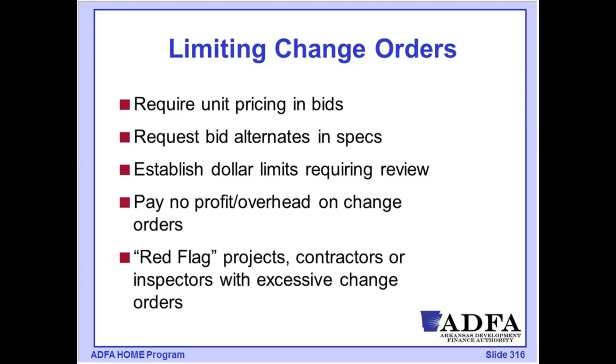We might have some bid alternatives within the specifications, so they'd already been priced as part of that process. We can put dollar limits in place for when that review is being required. Generally, our change orders are going to be done at no profit or overhead on a change order.